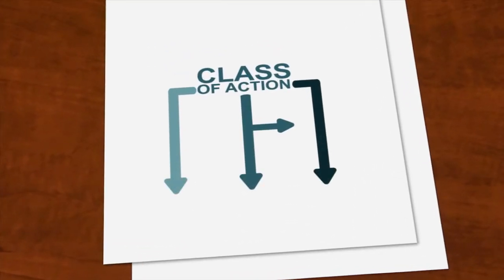The National Environmental Policy Act, also known as NEPA, is an environmental law that established the decision-making process agencies must follow prior to the design and construction of transportation projects that use federal funding or require federal approval. Following the right process or class of action is vital to properly completing the NEPA process. The significance of your project's impacts on the human and natural environment, not the project's size or cost, determines the project's appropriate class of action.